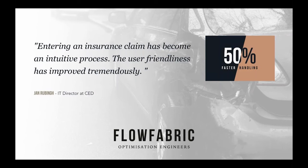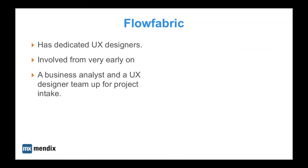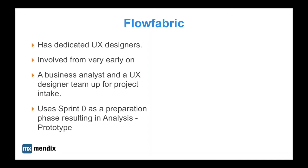How did Flow Fabric manage to pull it off? Looking at how they integrate UX in their projects: they have dedicated UX designers working on projects from very early on — in fact, they team up a business analyst together with a UX designer for every intake. They use a preparation phase in the shape of a zero sprint, UX involvement remains throughout the project, and quality assurance is realized through a UX review of the application at the end.